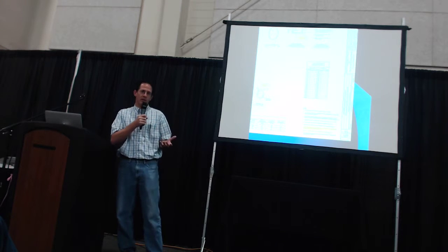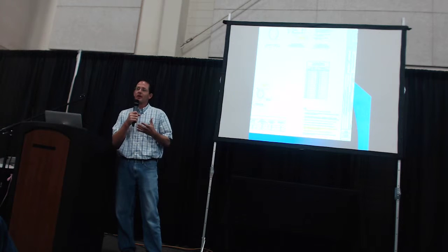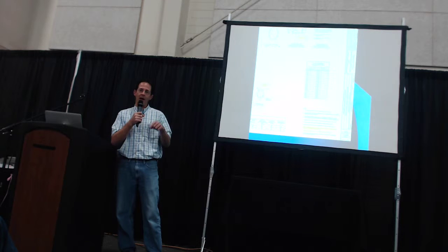And then they submit the pile driving submittal, the hammer submittal information, and then the designer runs a WEEP analysis again to determine whether or not that particular hammer will indeed be able to drive the pile into the ground to the depth without damaging the pile, and to be able to verify the capacity of the pile.